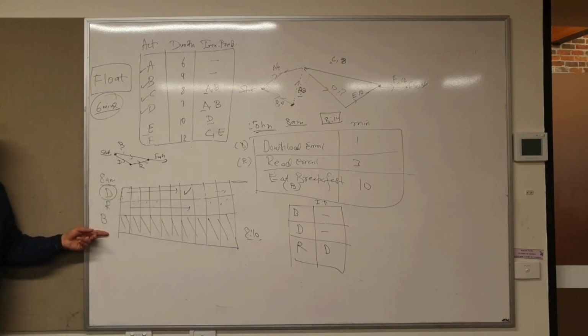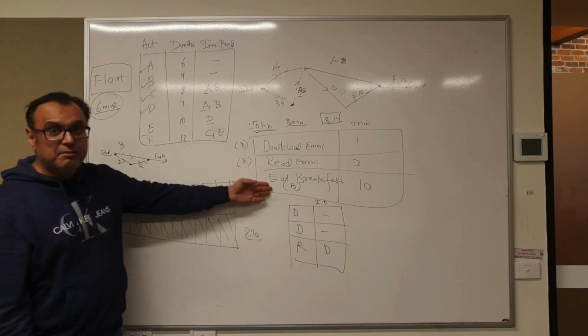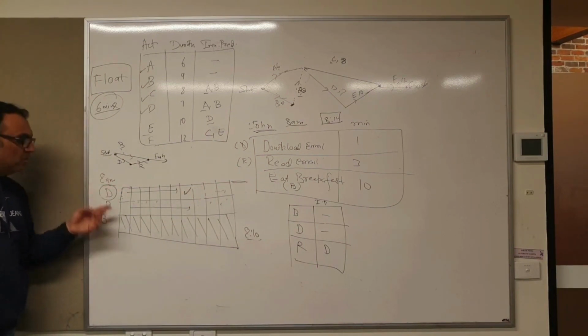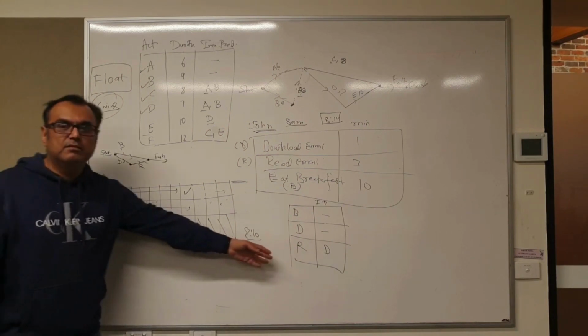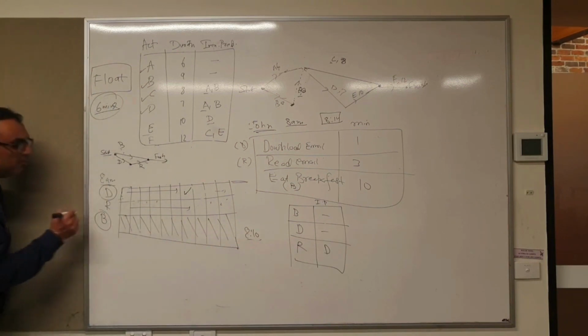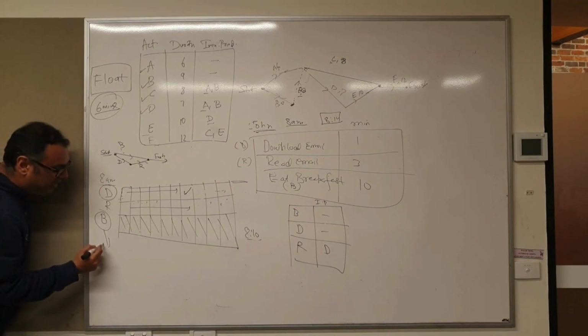But eating breakfast cannot be delayed even for a minute. Let's say he has to leave by 8:10 and breakfast needs 10 minutes, he has to start at 8 a.m. The moment he delays his breakfast by 1 minute to 8:01, the train's gone. So this activity B or breakfast has no slack in it, no elasticity in it, or literally I should say it has no float.